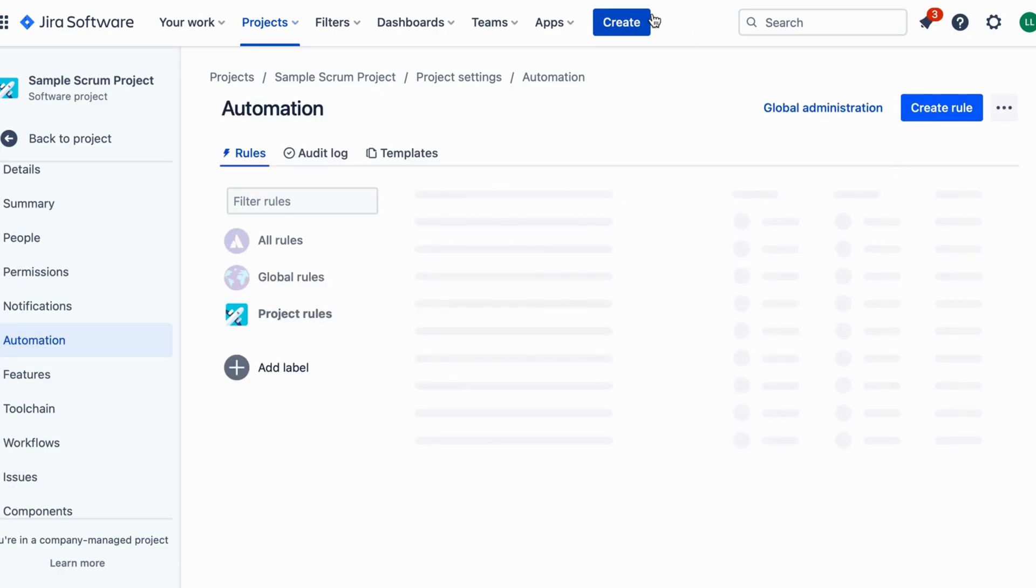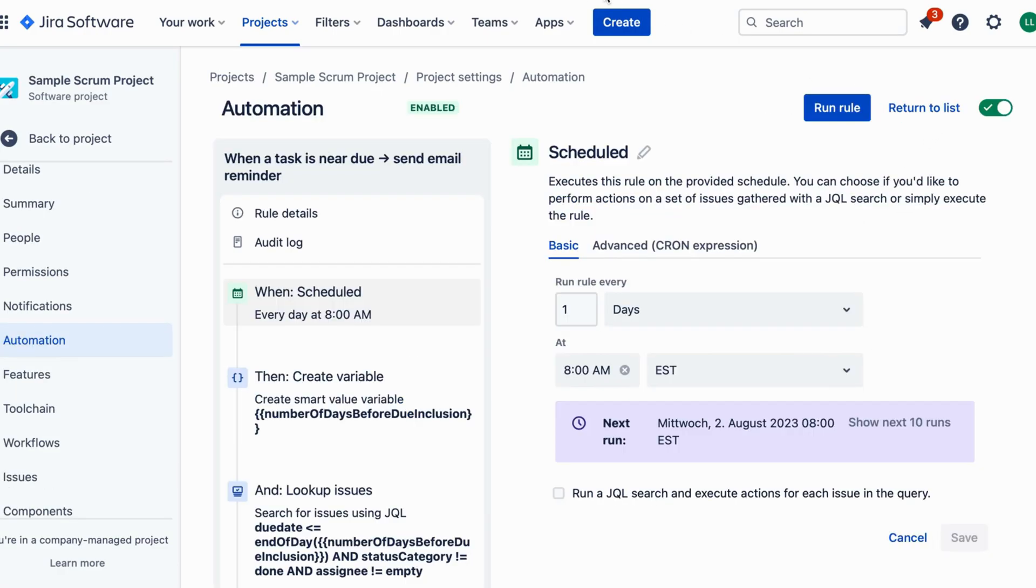Now let's choose our trigger. In the when section, select issue updated from the drop-down menu. We want our rule to be triggered whenever an issue is updated.